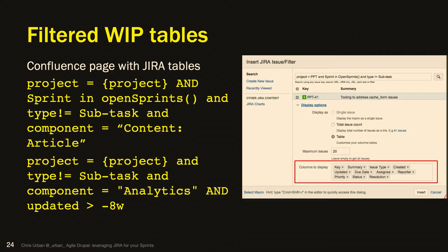If it got to QA and the person doing QA said, nope, failed, you have to have a reopened state. You don't send it back to in progress because that means somebody's working on it right away. You have to have another queue to hold it, not ready, but a reopened state. If you have your workflow set up that way, you can track that specific path, as opposed to rejected by the customer in UAT to reopened.